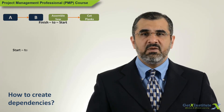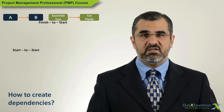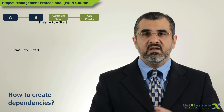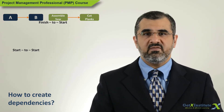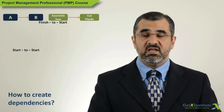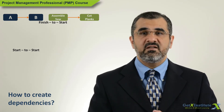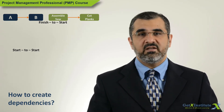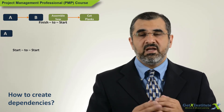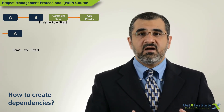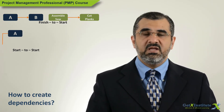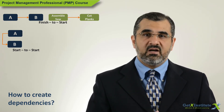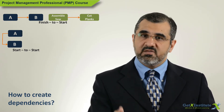Another type is the start-to-start relationship. Start the predecessor activity and then start the successor activity. If the predecessor is late, the successor activity will also be late. So start activity A, then start activity B. If the start of A is late, B cannot start — it will also be late.